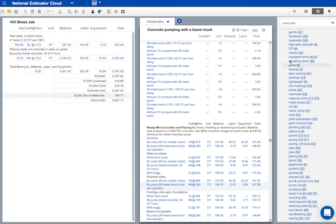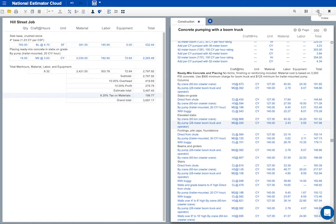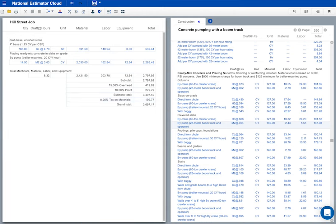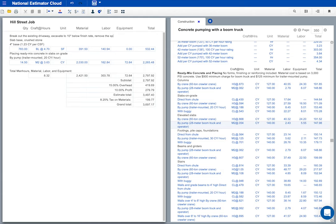Let's keep going with this Hill Street job. Demolition of the existing driveway will be done by a sub. My demo sub bid 3500 to break out the existing driveway, excavate to 10 inches below finish grade and remove the spoil. I'm going to add the subs bid to my estimate. I'll right click here where I want to insert the sub bid and click to insert the work description. You can add anything to an estimate even if it's not in the Craftsman cost books. Subcontractors are a good example. Okay, that looks about right.